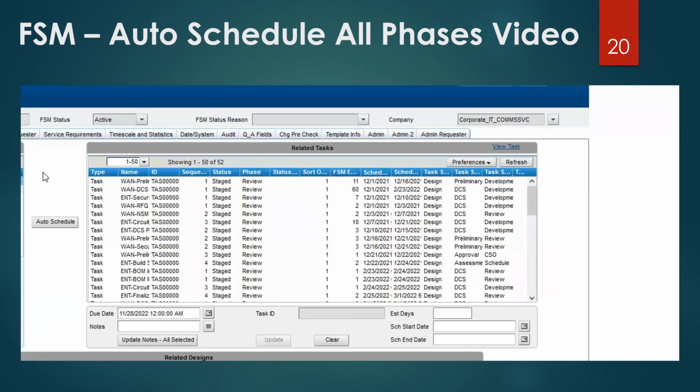If you choose to do all phases, I can't allow you to do that. So as soon as you get a date for the last task on the first phase, I have to use that for the start date of the next phase and just assume that you're going to go in a process. It's an assumption that the tool has to take just to get through it.